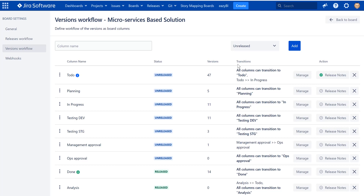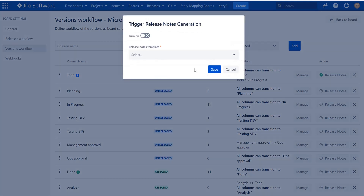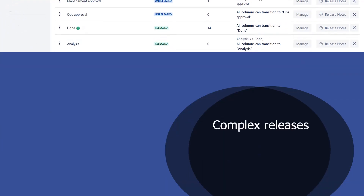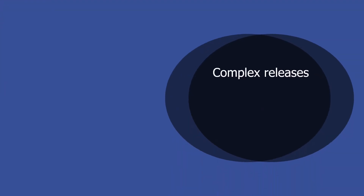Any restrictions can be applied and configured according to your needs and workflow. If you want to restrict moving versions from one status to another to a certain group of people, you can easily do so. You can also define actions coupled to a transition — for instance, at some stage you may want to force release notes generation.